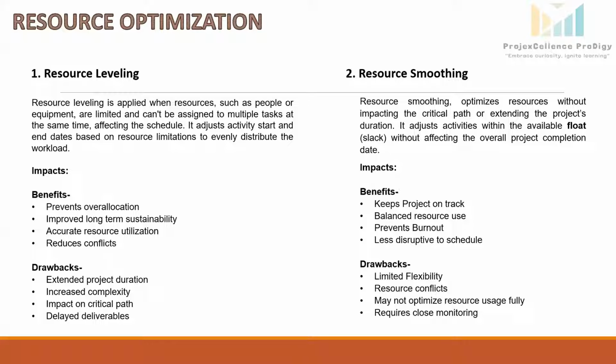So, in this situation, we could apply the resource leveling technique. We have to adjust the timing of the tasks which require the crane. Suppose two tasks require the crane, so one task may be delayed until the crane is available. So what will happen here? The project timeline will be extended. We will talk about the impact of leveling on the project.